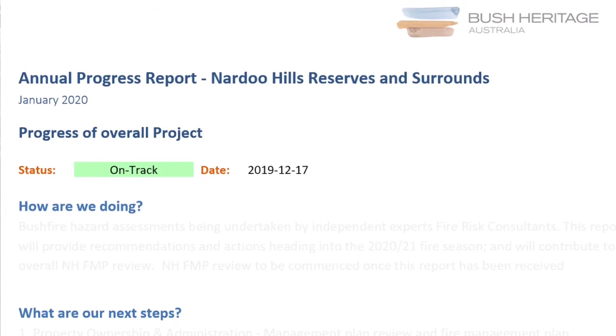So this helps us think about, can we just keep going into the next year at about the same pace? Do we need to try to find more resourcing? Or is it basically everything okay? Or do we need to really rethink a strategy or change an aspect of the plan? So with all that kind of insight, the team can then collate an annual report, which we do in Marathi, outlining progress, next steps, lessons learned for the year. And then they can update the budget for the next year.